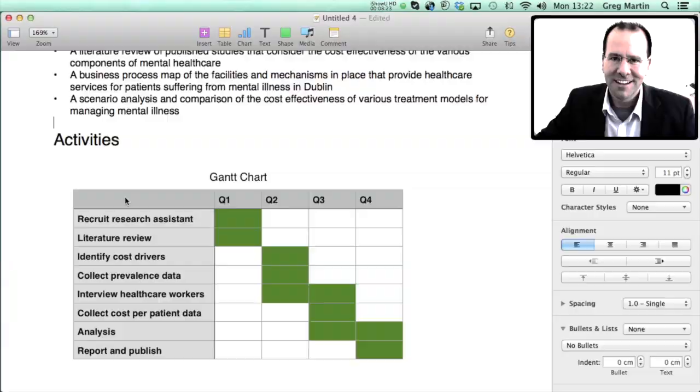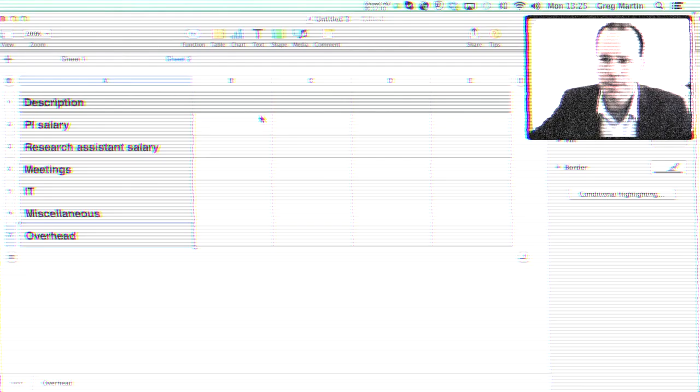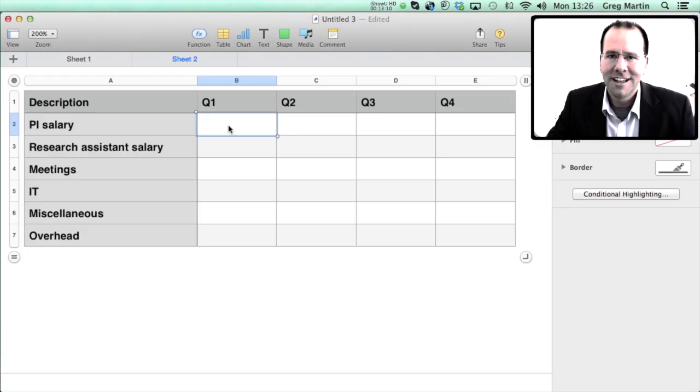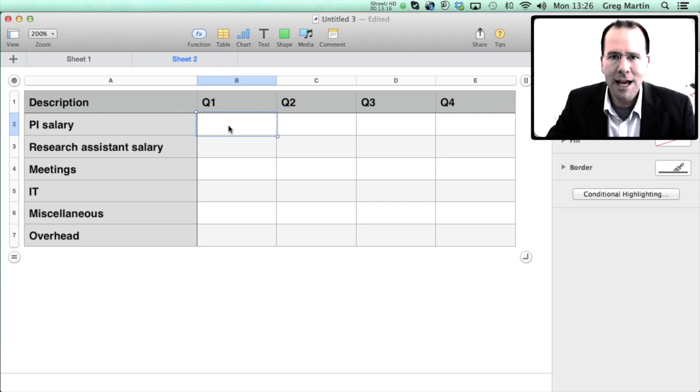The next heading is budget and this is extremely important because this tells the funder that you've thought about what things are going to cost and you've thought about how it is that you're going to spend the money. So before we even start talking about what different things are going to cost let's again put together a list of what needs to be done but now we're going to be putting that list together thinking through where it is that we're going to be spending money. Now for each of these cost buckets we're not going to be putting in a dollar amount at this point. What we want to do is we want to think through how the unit costs associated with each of these line items is distributed over the four quarters.